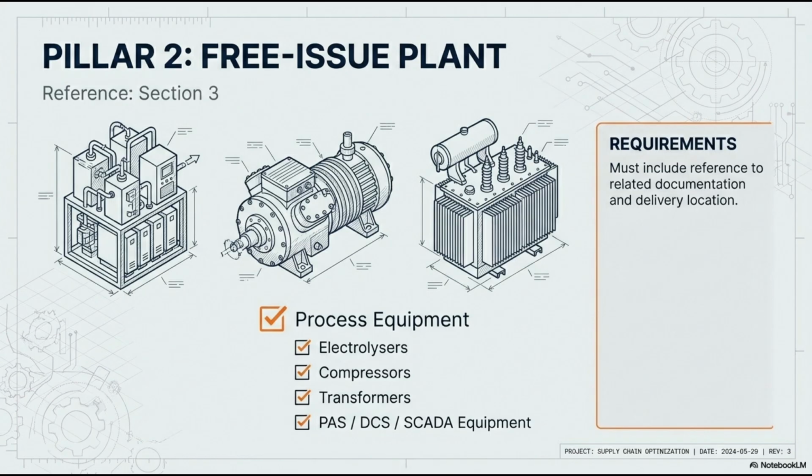Exactly. But then there's the other option, EXW. Ex works. It sounds so harmless. It is anything but harmless. The text explicitly defines EXW as meaning the contractor must provide the transport to the site. Wait, walk me through the actual logistics of that. Let's paint a picture for everyone listening. The employer buys a massive turbine in, say, Germany, and they tell the contractor, hey, it is yours, free of charge, ex works. That means the item is sitting on a factory floor in Germany.